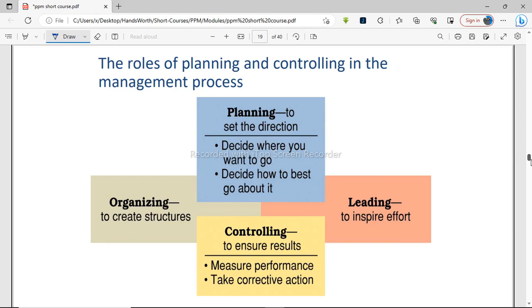And this usually happens during the monitoring stage of a project, because under the monitoring stage of the project life cycle, we said the project manager or the supervisors are trying to compare what's been done on site and what is in the plan. Are these two things reconciling? Are these two things tallying together? And when they see that maybe what is being done on the ground is not what was in the plan, then they will have to start making some adjustments so that things are able to catch up with what was intended, or so that the activities being conducted follow the same standard, or the same pace or speed that was intended for them in the plan.